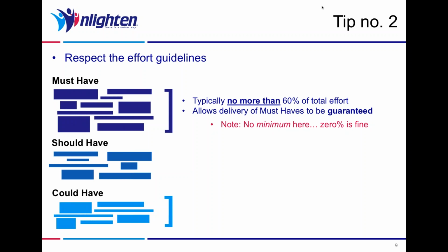It's also worth noting that you might have a project where there are no must-haves at all. If you've got a project where you're enhancing an existing system or capability within the organisation, and you may have, I don't know, a list of 30 ways you could add value or do more, but you might acknowledge that if we did nothing, we'd still be able to carry on in business, we'd still be able to do the things we're doing today.